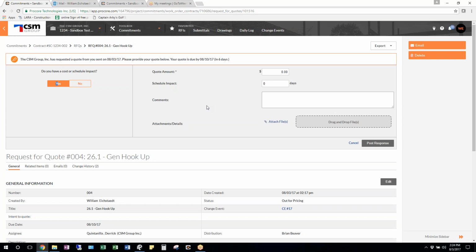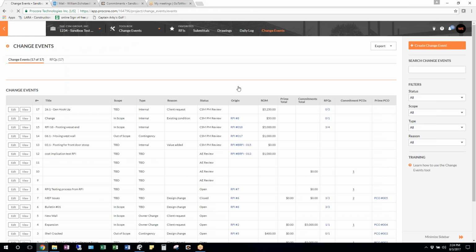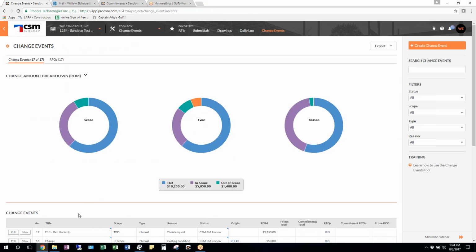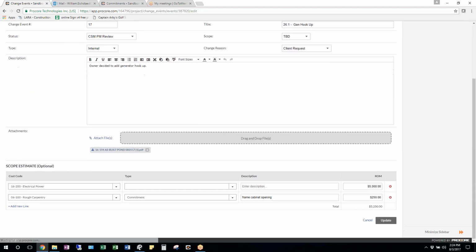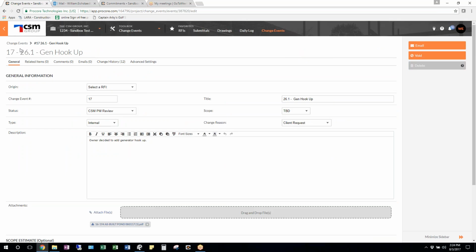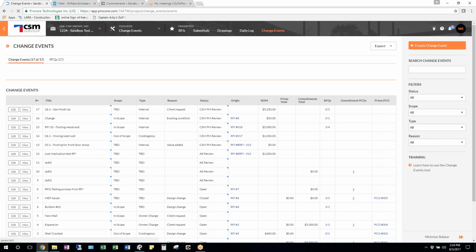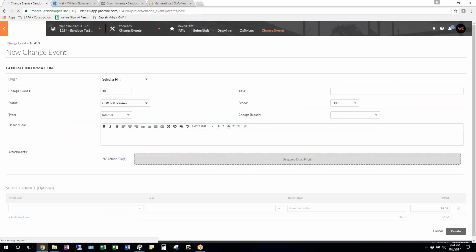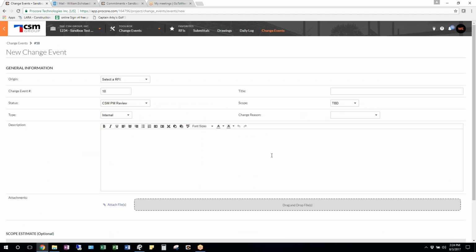Walk me through the request again. Okay. So you're creating the change event. Yep. We'll start a new one here. We'll start from the beginning. Create change event. Fill in all your general information, title, details, scope, reason for change.